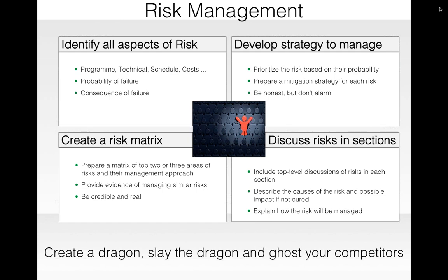And the transition may even fail because the right information is not being shared with you. So, what is the probability of the failure, and what is the consequence of the failure? Like in this case, if the probability of risk of transition is high and it occurs, then what will it impact, where will it impact? It will impact the schedule, it will impact the cost.